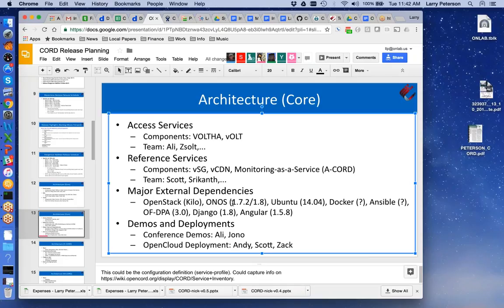That's high point one. High level point two is we need to, in our release planning, pay a lot of attention to tracking the requirements for upgrades. So we had one requirement for an upgrade to Ubuntu 16.04, but that has ramifications down the stack, OpenStack, and so on. Right. So nothing else to resolve. Just an awareness on that. Anything else on the architecture?